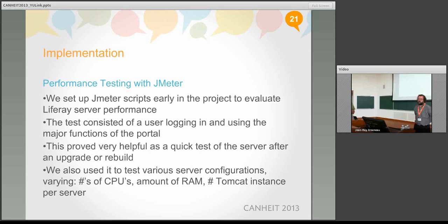So, some lessons learned, particularly around vendors. Be very demanding with a new vendor, particularly with respect to architecture and build, test, and especially documentation. If I were to do it all over again with our primary vendor, I would have used a small project to evaluate, particularly to set expectations around documentation.